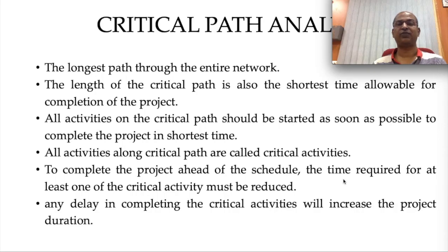So today we'll start from that diagram which we discussed last day, and we'll move on to the CPM method or critical path analysis method of analyzing that network. A critical path is the longest path through the entire network. The length of the critical path is also the shortest time allowable for the completion of the project. All activities on the critical path should be started as soon as possible to complete the project in the shortest time.